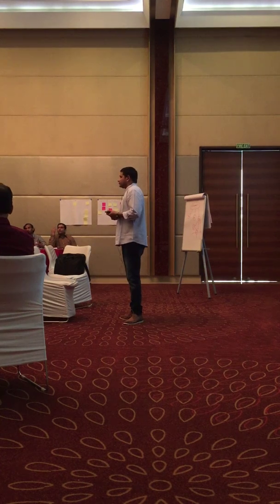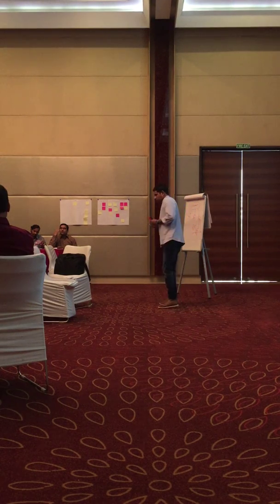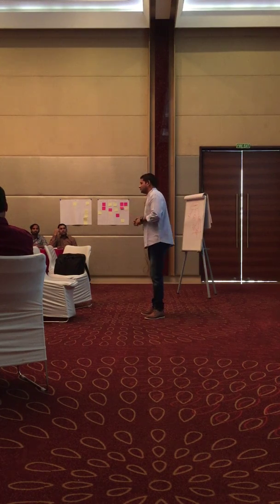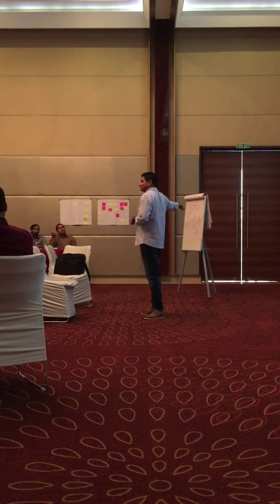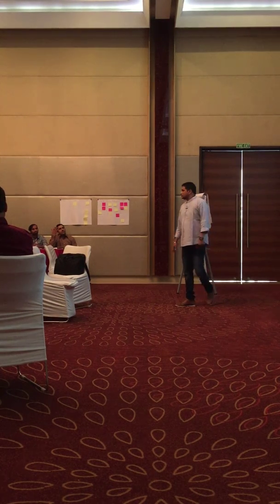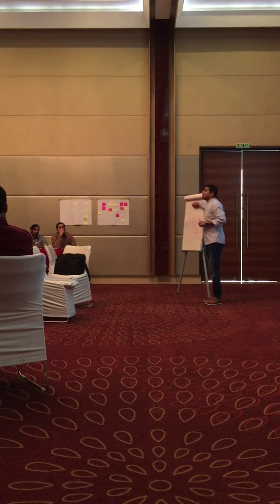Okay, when we split it into a number of user stories, like the epic is 100 points, we have estimated that the sum of these user stories should match up. Not really. Because some things you may ignore. That is simplicity, the art of maximizing the amount of work not done is essential. How valuable is sorting by first name? It may not be really valuable, so remove it. Through collaboration only. There is nothing like balancing. You don't need to really do that. What is important is whether we are achieving the scope of this or not by doing this.